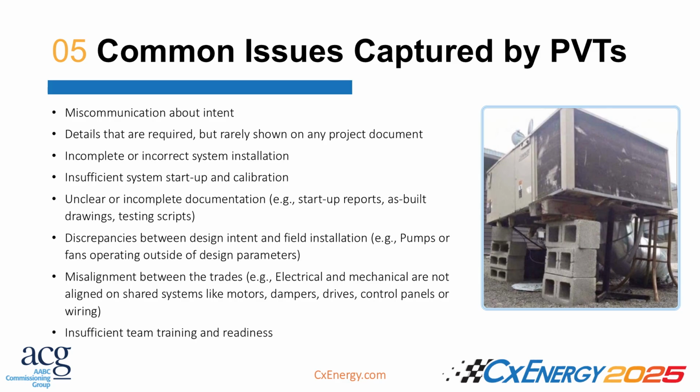So with all seriousness, how do you go about making pre-verification testing a requirement on your project? It's basically the first thing you have to do. You have to buy scope, right? Because even though we said that pre-verification testing benefits everyone, somebody has to spend time actually performing those activities, which means it's an extra scope. It has to be bought. How do you buy scope? In a spec, right? That's the only way to buy scope.